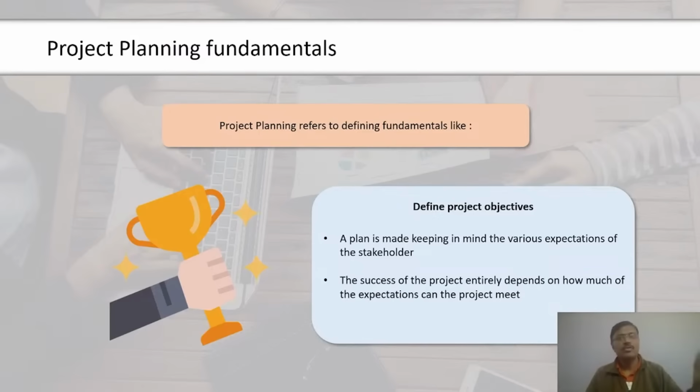Any project can be done successfully if there is no constraint on time or there is unlimited budget available. Unfortunately, that is not true in real life. A project is performed within some constraint, and these constraints are usually competing. Therefore, if you change one, it would affect the other. For example, if the project duration increases, it would lead to an increase in the project cost as well. Triple constraint is a term that originally referred to the three competing project constraints within which the projects are performed. These constraints are cost, time, and scope.